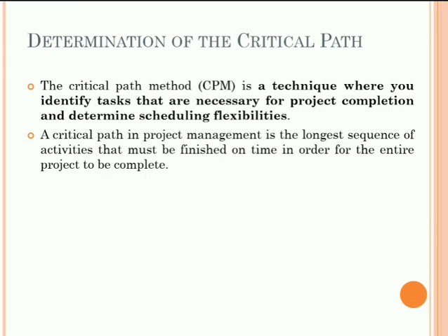This is how a network diagram can be created. If we identify the different task dependencies, then we can create the network diagram, because in it we use boxes to show the different tasks. Then by showing the arrows we can check the dependencies of the tasks.